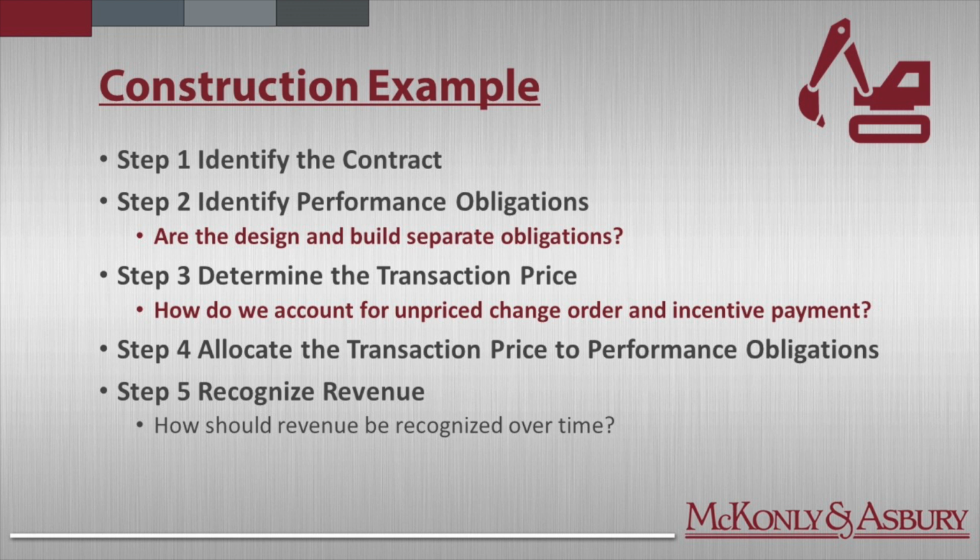Step 3. Dan, on step 2, when would you typically see 2 or more performance obligations? Because I could easily see how this could be. No, absolutely. I think for this example, we're going to consider this to be one obligation, because the design and build are so interrelated. From start to finish, the whole objective is to build a bridge. While you could make the argument they could be 2 separate performance obligations, the guidance and the examples we're seeing at this point show they're so interrelated that it's one performance obligation.